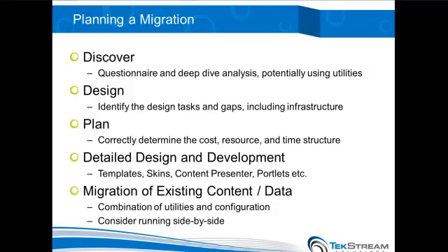This is going to be complex, and there's certainly going to be some twists and turns as you go through, but it's doable, and there is a direct path to get there. So once you've identified those, you can take a look and say, here's the breakdown, here's the time it's going to take, here's the resources internally, externally, whatever is needed for it, and only then should you move on to the detailed design and development.